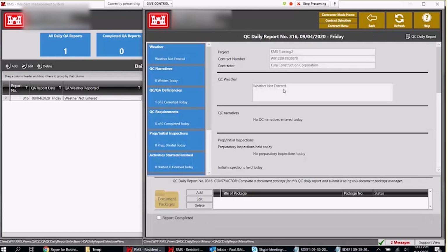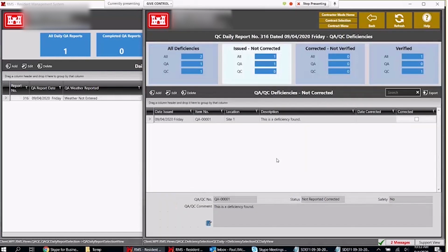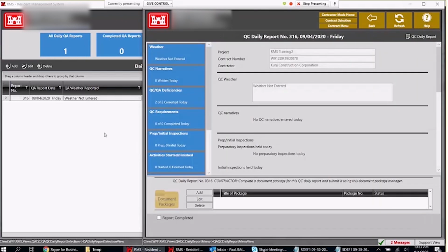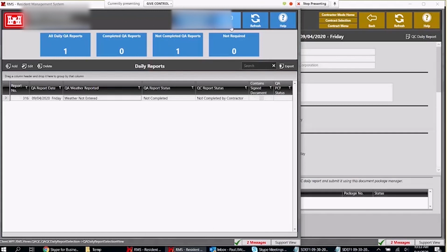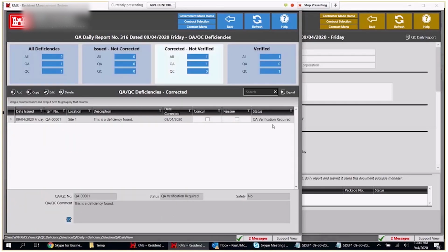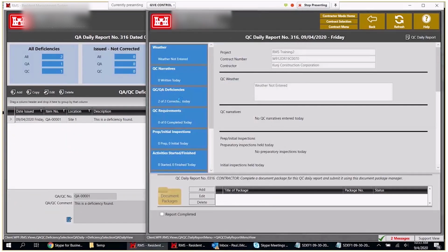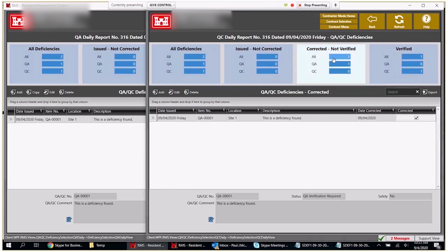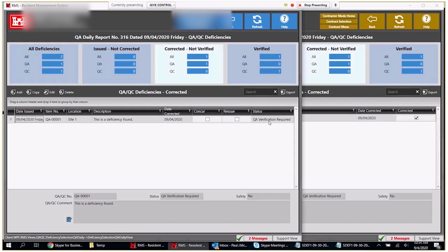So the whole purpose of why we're going through this is so that these items that are deficiencies are actually linked to those same pay request items from that SDEF file. So it's really showing that, RMS not controls, but it links all, it really shows the importance of a proper schedule and a proper SDEF file, and makes your life and the contractor's life really easy to be able to validate these things, because when you're reviewing pay requests, you can go in and see what deficiencies are still outstanding, and you can see what activity they're linked to, and same with the contractor.